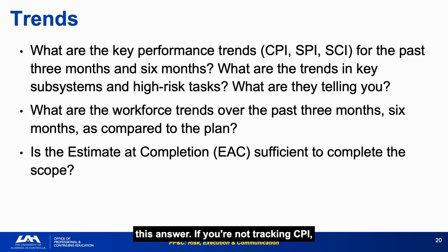If you're not tracking CPI, SPI, and EAC trends on a rolling 3-month and 6-month basis, you're not doing trend analysis. You are doing monthly reporting. The distinction is the horizon.